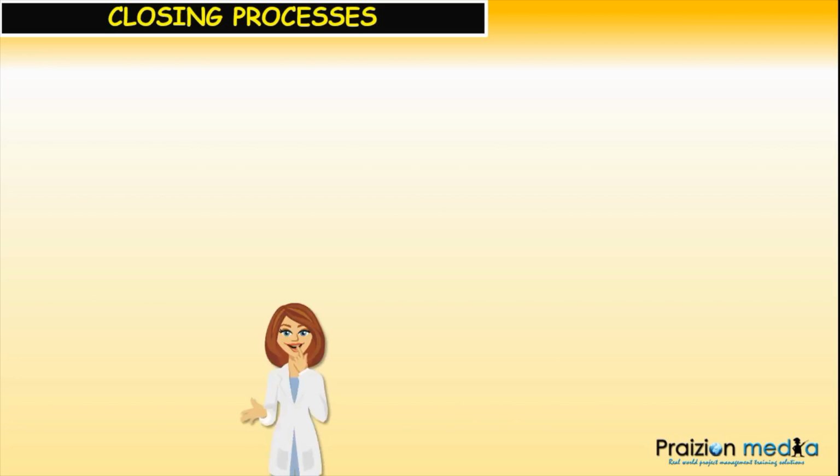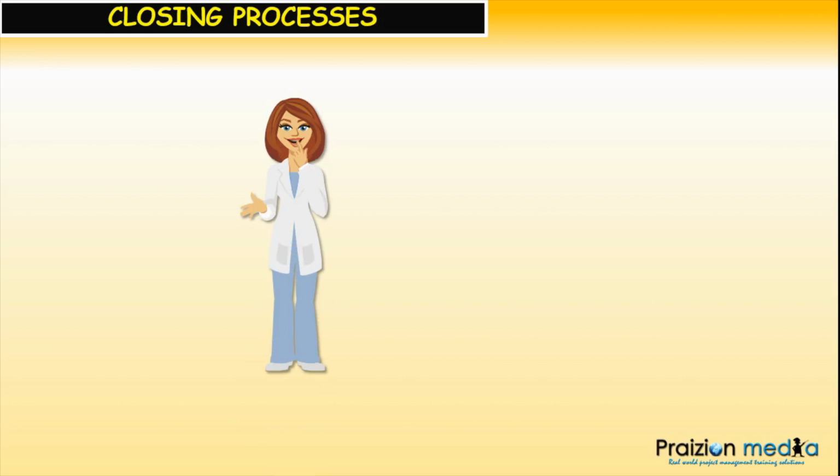So in closing, we know the customer has accepted the deliverable. By the time you get here, one of the big things is close project or phase. You could close out a phase within a project, or you could close out the project as a whole. Now, if you're closing out a phase, do your lessons learned. Make sure you don't carry bad habits to the next phase.